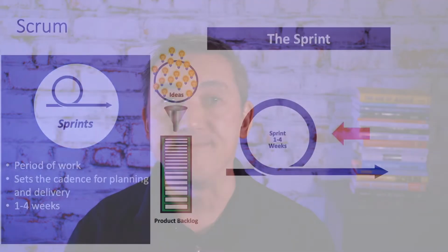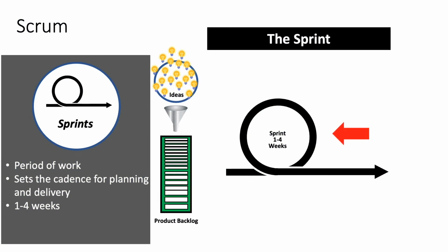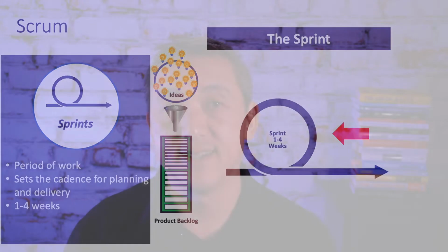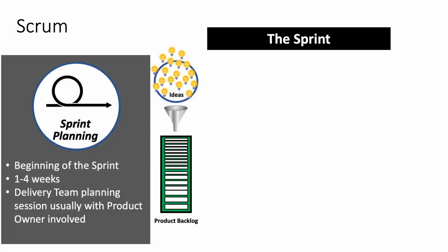When we start work, we use a pattern called an iteration. Many people refer to iterations as sprints. Teams decide the sprint length and keep sprints to 1 to 4 weeks long. Most companies have sprints of 2 weeks or less. These sprints are planned back to back so that a cadence is created. So if you plan a 2 weeks long sprint, you'll get 2 sprints a month, 6 sprints a quarter, or 28 sprints a year. At the beginning of a sprint, the team does sprint planning.